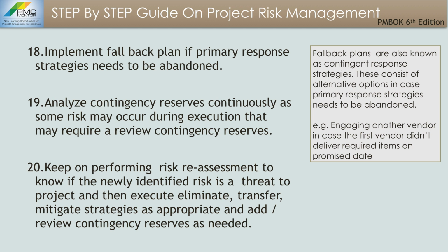Number 18 is implement fallback plan if primary response strategies need to be abandoned. There is a typo here, forget it. Analyze contingency reserves continuously as some risk may occur during execution that may require a review of contingency reserves.